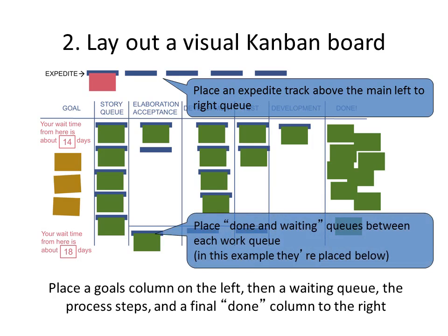Now, Kanban follows the key pull principle. So, whoever is in charge of a specific lane picks up the item from the previous lane, and once they're done with it, puts it in the done section of the lane. So, for the next individual, the next lane in charge, to pull from that. It's not pushed to the next lane till the other person is ready to pull it on their own side.